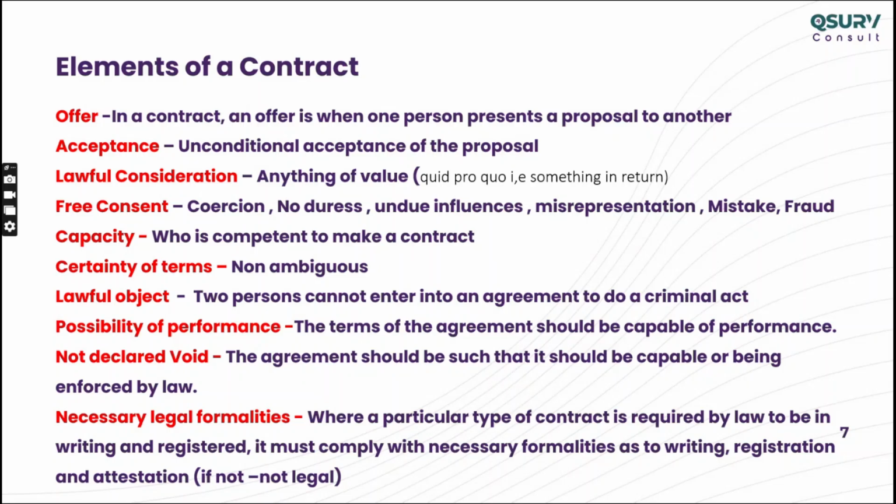Again, next step, acceptance should be communicated. That means when you send an offer, say a contract or RFP, whatever, or if you send a LOA, if you receive an LOA, you sign it and you keep it with you. You didn't communicate to him. That is not an acceptance. So when you sign, if you're ready, you have to communicate back to them: yes, I'm ready to do the work, I'm unconditionally accepting. So it has to be communicated. So guys, make sure when you review the contract, there is an acceptance communication from the contractor.